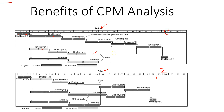The strategy the project manager is using here is to reduce the duration of the overall critical path. The way it is being achieved is by redeploying some of the resources from the non-critical activities to the critical activities. Here you can see that activity seven has four bricklayers, so the project manager has decided to move two of those onto activity two.